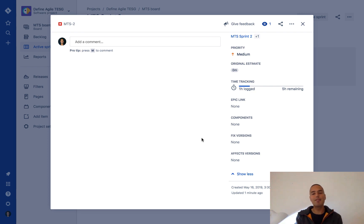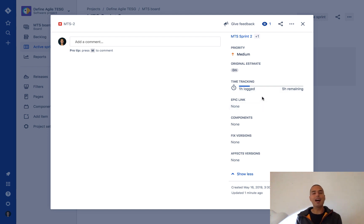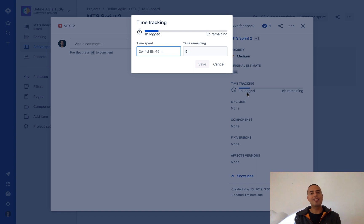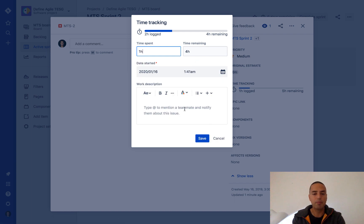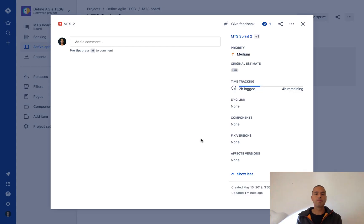Here you can see that this changed and it's easy to see how much time is remaining and what I did log. So let's say I want to log more time — I just click on it again and now time remaining stays the same. I say one hour, 'fixed first part of the bug,' click save, and here you have your two hours logged and four hours remaining.